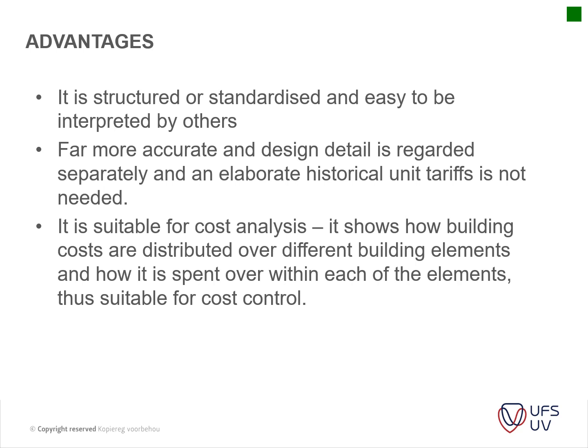There are specific rules of how items are measured, or the components are measured. It is far more accurate, design details are required, and an elaborate historical unit tariff is used. So you can use old projects, usually bills of quantities, to determine your historical rates.